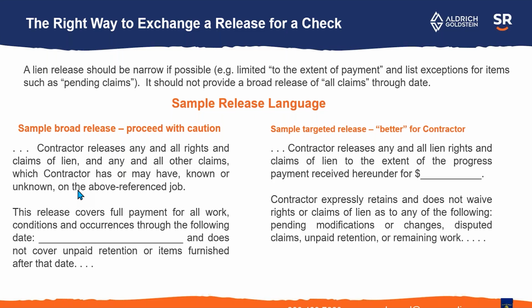That makes it much harder to make a claim if you didn't know about it, but you've already waived the right. So payment number one, you've waived all of your rights, but as it turns out, in the first week of the job, you have a delay claim or something like that. But since you've already signed the release, the owner's going to say, well, it's too late to make that kind of a claim.